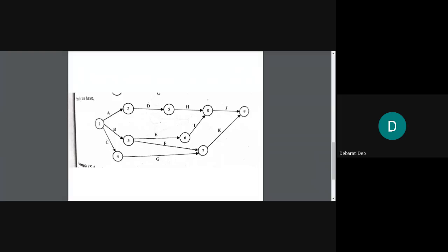Okay, then come to B. B is less than G and F. So below G and F, you write B. Also, below G and F, you also write D. Put a comma and write D. Then below H and K, you write F, because F is less than both H and K.